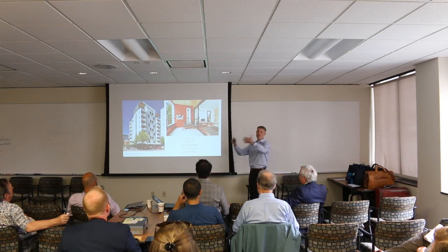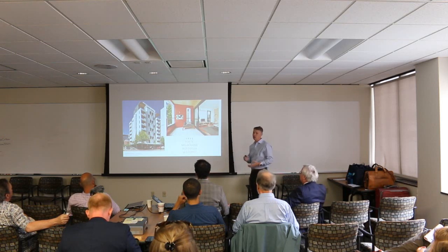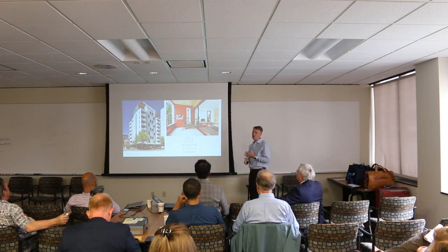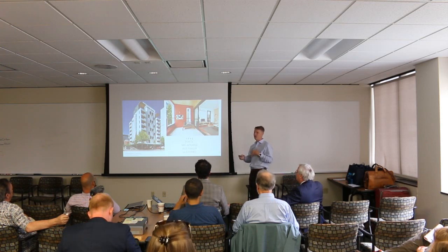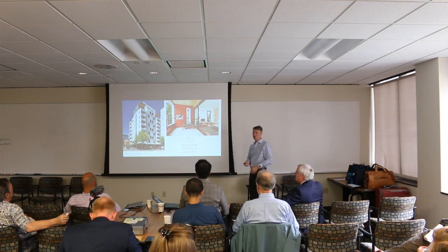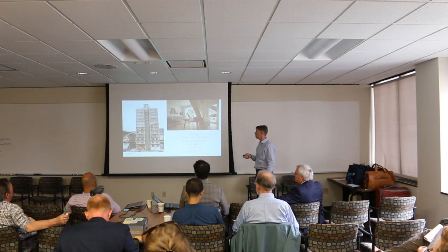And he had to pull everybody off the job site, finish pouring the reinforced concrete stair tower and elevator tower, and then bring the CLT guys back in. They broke ground for foundations in late January, early February, and had tenants in September of the same year on a 10-story building. And that's the story for the developers. That return on investment: you've got tenants in the same year, your construction loan is done, and you've got return on investment coming in. So that's the story behind the CLT, the speed of construction.